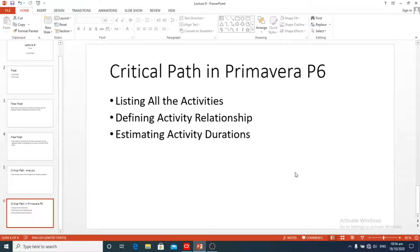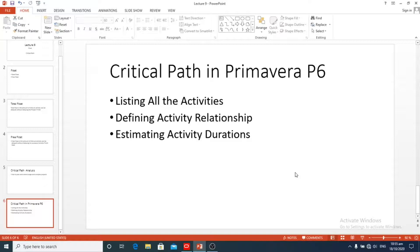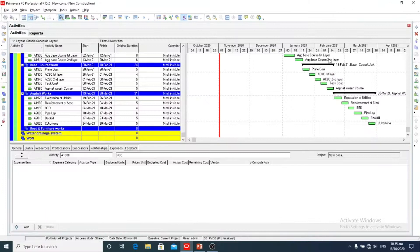Activities on the critical path cannot be delayed. Analyzing the activities on the longest path or critical path helps us to understand our project's current situation. If the activity relationships are not correct and lags are wrong, the critical path will not demonstrate the real condition of the project.